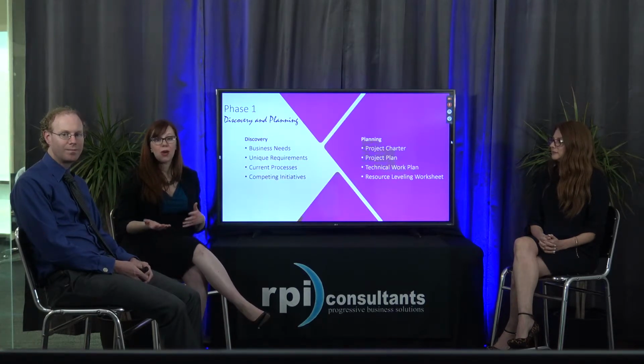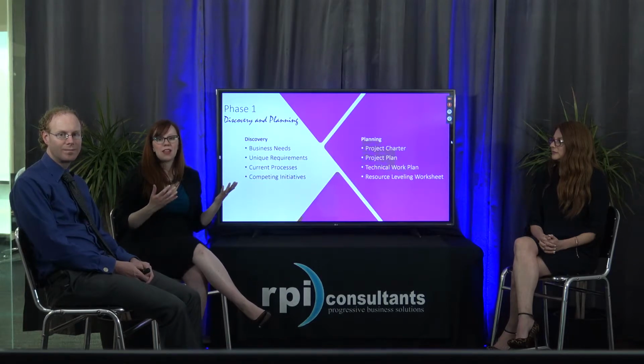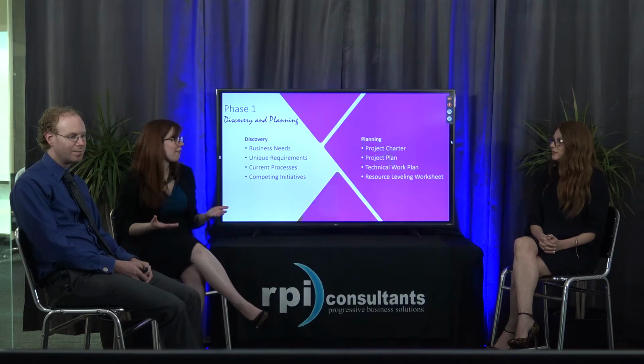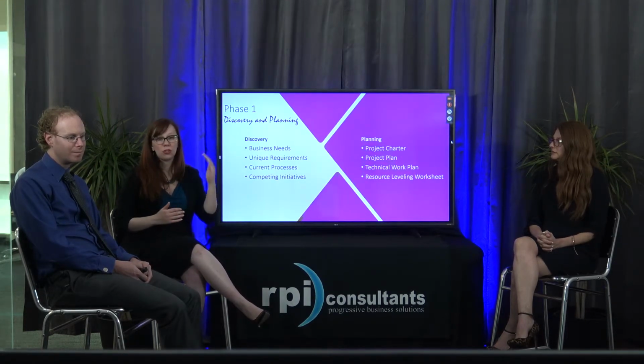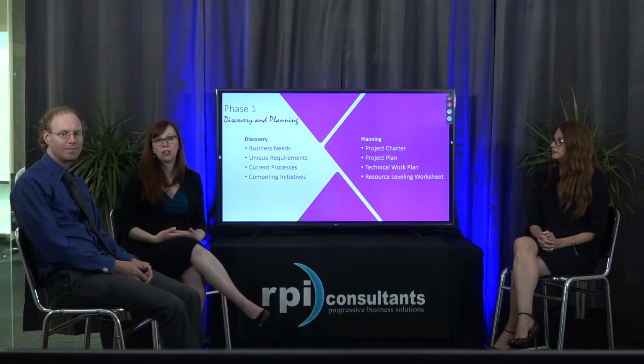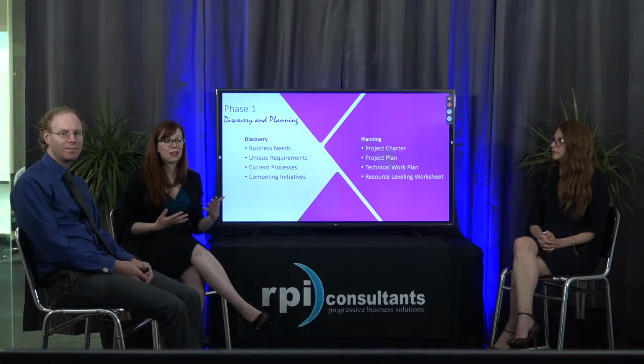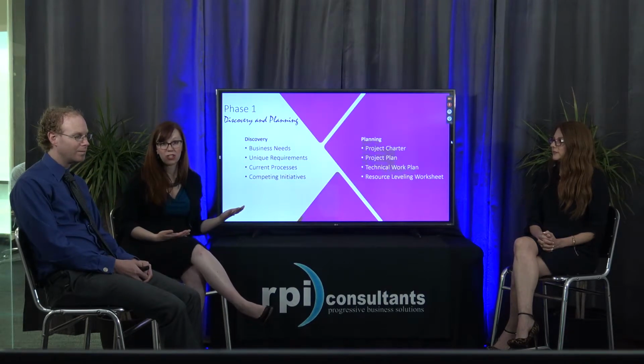It also really defines the high level responsibilities, and we look at staffing at this point. We have our list of roles and what each role is responsible for, but this is where we put project team member names next to the roles, and we look at what the requirement really is. I mean, is this something that someone's going to do with 50% of their time over the duration of the next year?